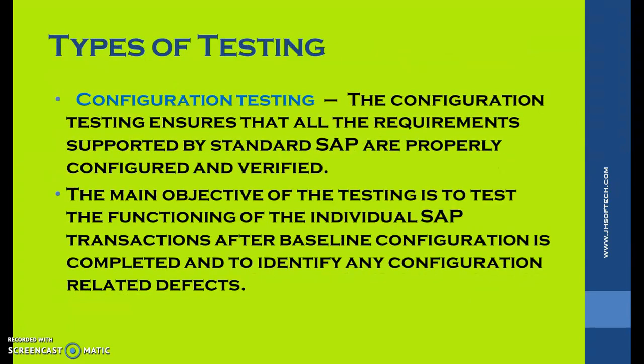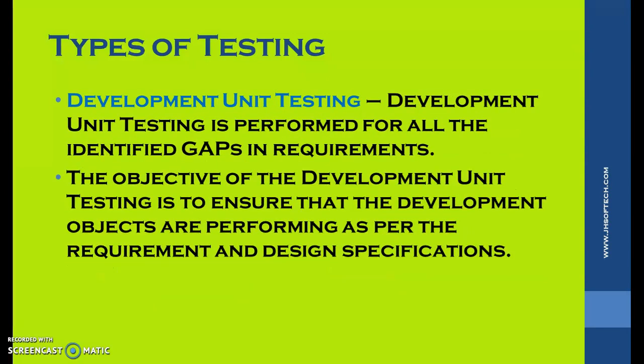Configuration testing ensures that all the requirements supported by the standard SAP are properly configured and verified. The main objective is to test the functioning of individual SAP transactions after baseline configurations are completed, and to identify any configuration-related defects. For example, if FICO consultants have configured everything from company code to fiscal year, we test whether those configurations have been done properly.